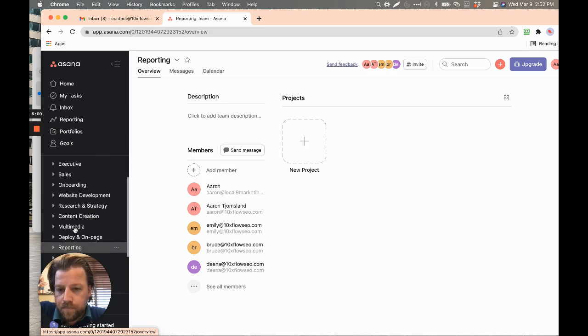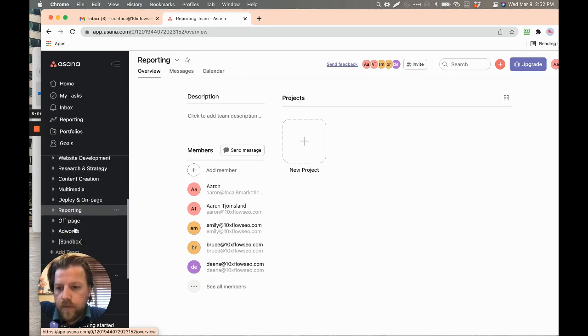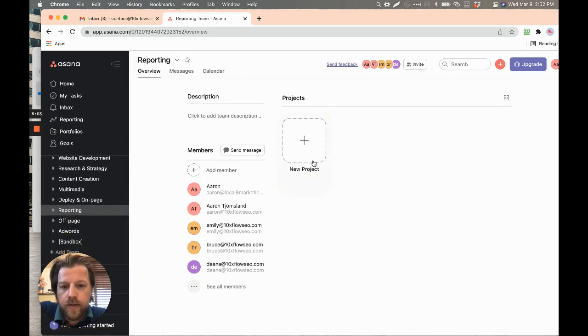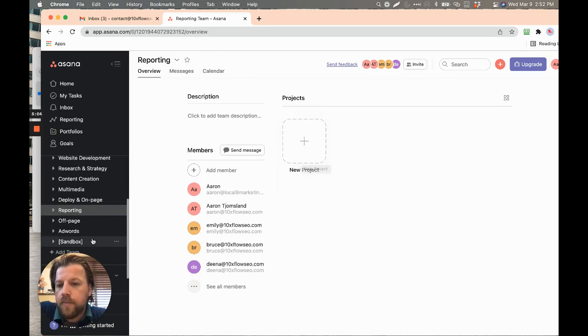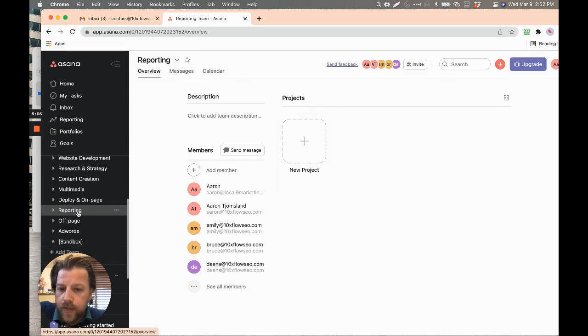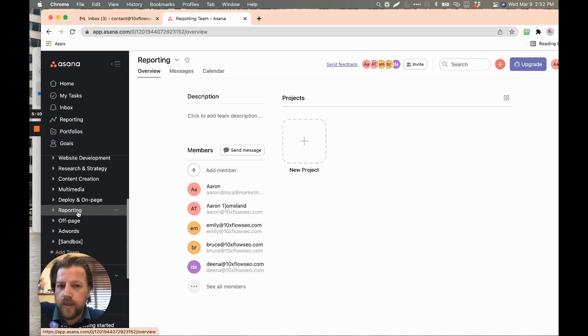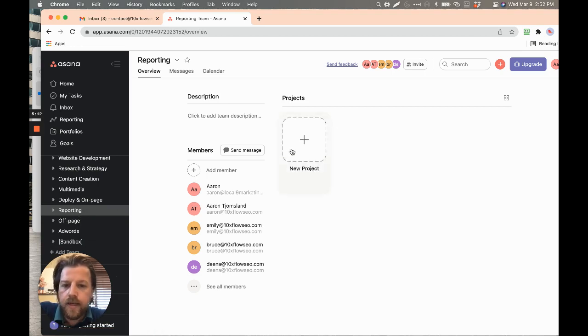And so reporting here. So if we want an objective within it, it would be something like monthly report. And then we break that down into weekly, all that kind of stuff as projects.